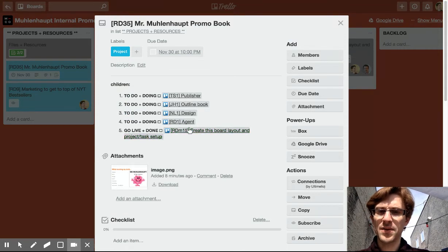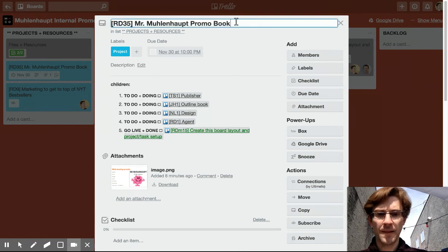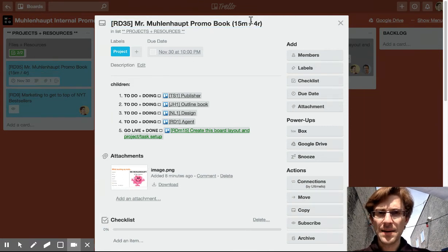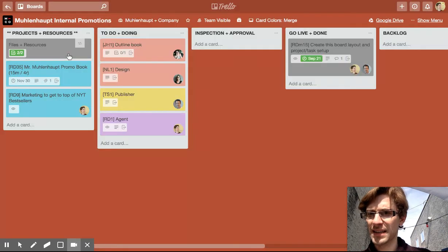So we know that we've got this going live already, and remaining on the project, we have in total, I'm going to put this at the very end, used 15 minutes for remaining. So now we have an idea of how much time is left, how much time has been put in, and what our budget for the total project is. So this is looking good.